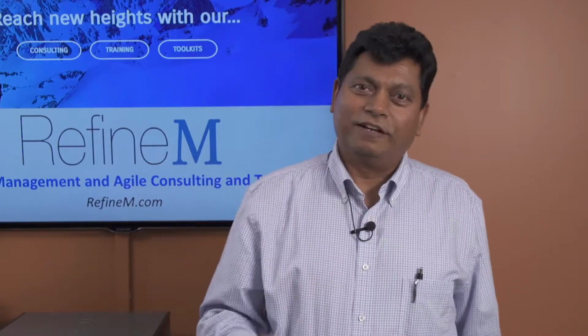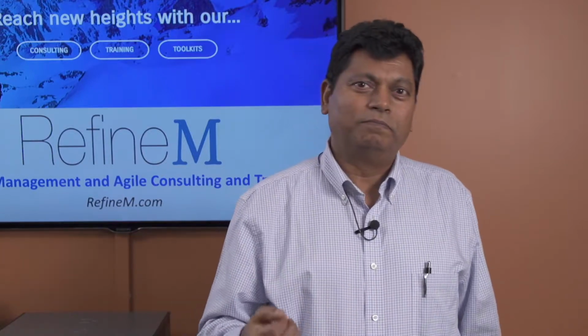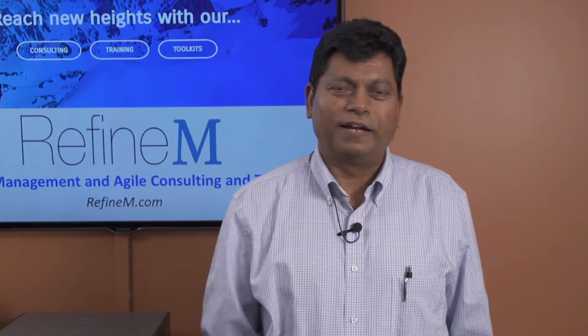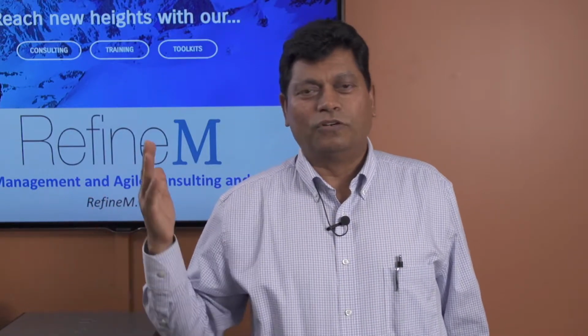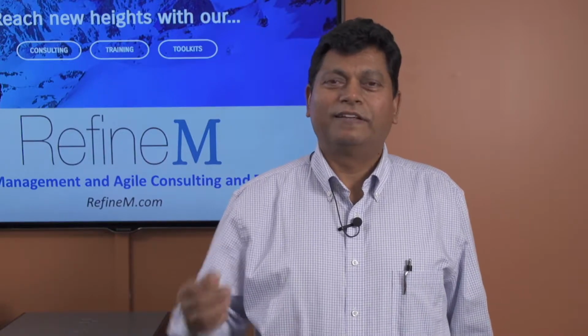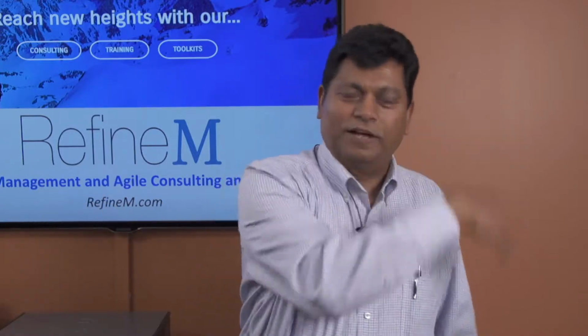So when I go and look at a project that is in trouble, I see one or more of these things missing. Most of the time, the things that are missing are the communication plan and risk register. Very common across all the projects. Maybe I have recovered more than a dozen projects. So on all of those projects, I can say with confidence that the communication plan and risk register were 2 things that were missing consistently across all of those. And there were some others which were missing.